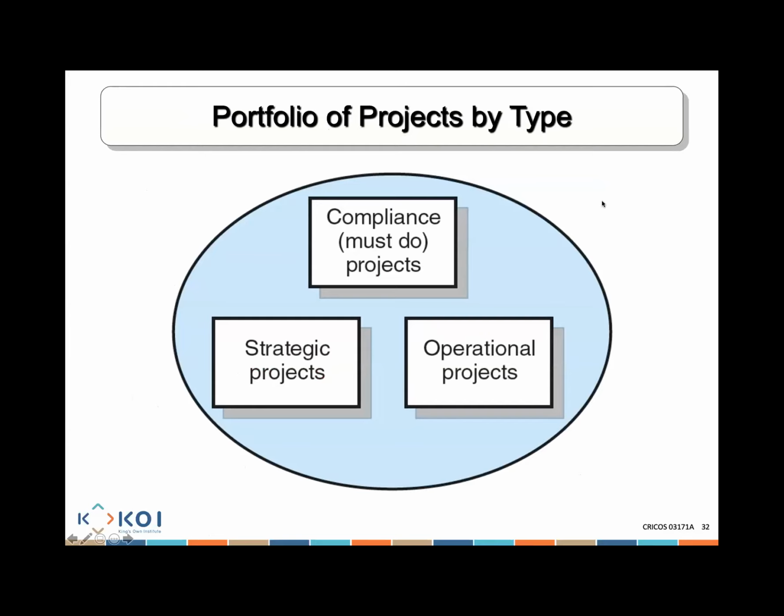When I think about projects, I think about different types of projects. A compliance project is a project that must be completed in order for you to operate. For example, can you open a childcare business if it is not considered to be safe? No. Why can't we? Is that a legal requirement? Is that a government requirement?